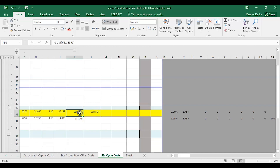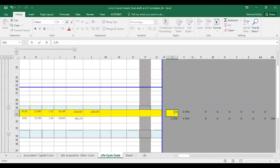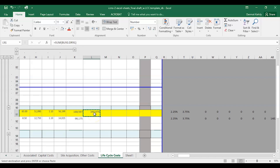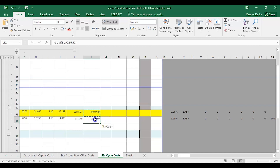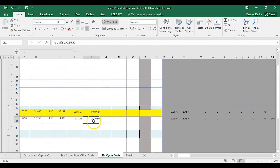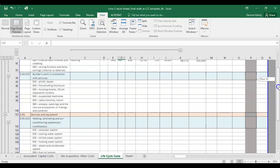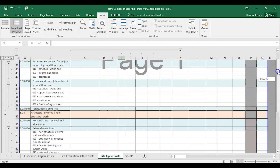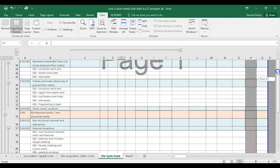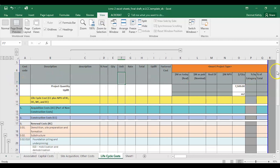I'll return the escalation rate to 2.25% and copy the formula, pasting special (formulas only) into the next row to get the nominal costs for the painting item. Scrolling up and down to check what's going on takes time, so one way to avoid that is to freeze the first six rows — highlight row 7, go to the View tab, and click Freeze Panes, drawing a line across so those rows stay visible as you scroll down.